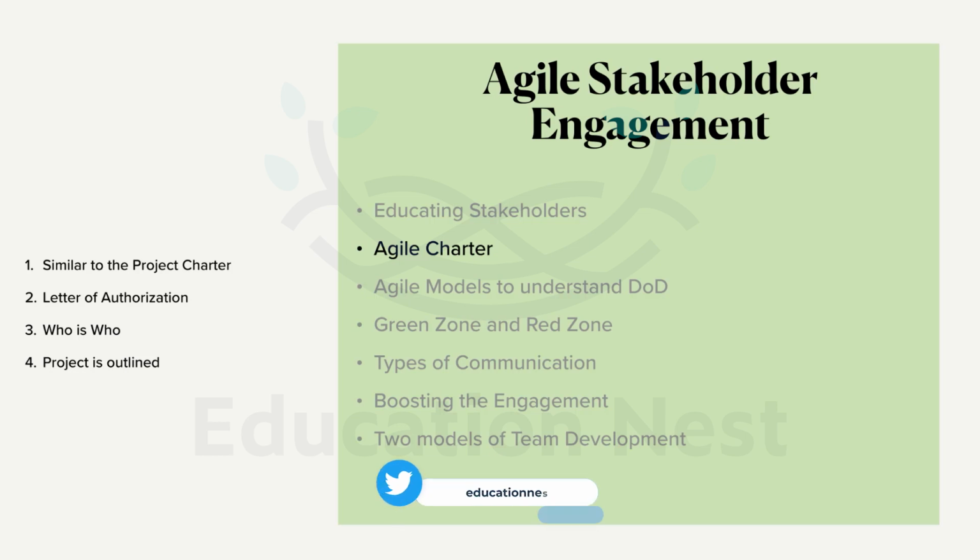They are vaguely identified, or just identified at a very broad level as per the company's hierarchy. Who can be the product owner? A new joinee who just joined the company last month cannot be the product owner. Of course, he might be a very senior person, but he doesn't know the process in and out. If he is a senior person, he might be an option for scrum master, because the scrum master has to be strong in the methodology, but need not be strong in the product itself.